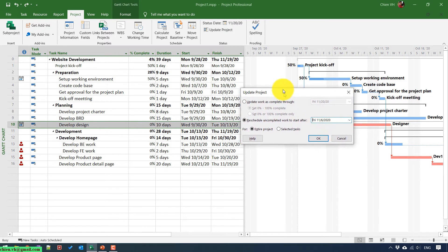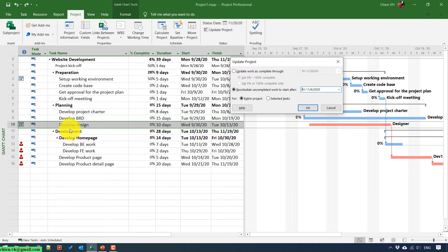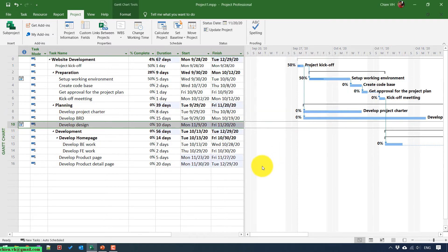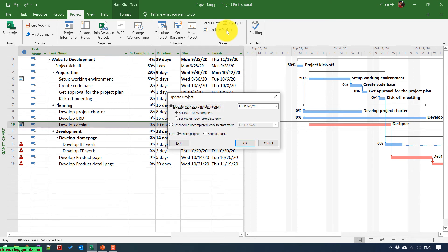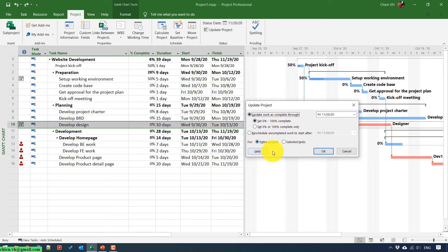Here in the task list, I'm currently selecting task 10, 'Develop Design'. If you select the 'Selected Tasks' option, that means I only reschedule for task 10. You can see this task will start on November 9th, while other tasks still keep their original dates. If I undo this and click Update Project again and select the 'Entire Project' option, Microsoft Project will update the timeline for all tasks in your project, not only the selected task but also all other unselected tasks.